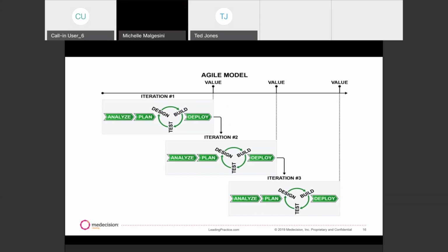Well, our customer was trying to test everything as we deployed it, and then we're telling them there's another sprint coming, there's another deployment coming, you've got to get ready to test this too. And they're saying, but wait a minute, this piece doesn't work. So again, it goes back to knowledge transfer and making sure everyone's on the same page. They didn't fully understand that we were bringing additional pieces online for them.